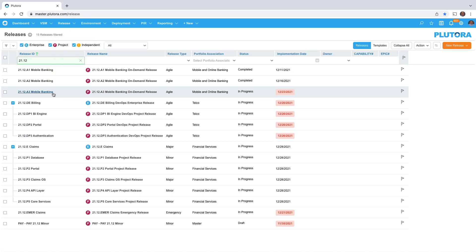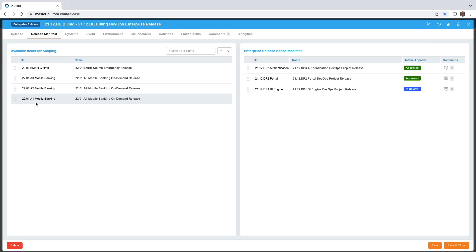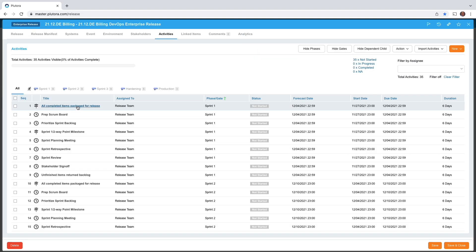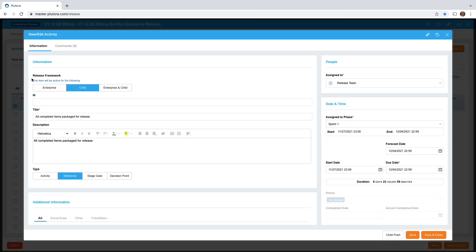Coming back to release manager, the enterprise release does have activities. If I look at one of these activities, there is a release framework area. What this is indicating is does this activity or criteria apply just to the enterprise release, just to the child release, or to both.